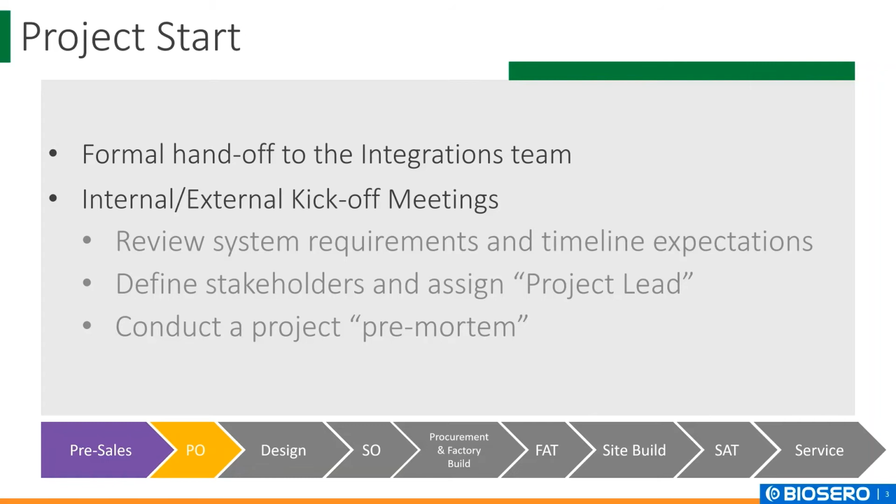The last step of the internal kickoff is to hold a pre-mortem, which is where we will openly discuss potential risks in the project and how we will avoid them. Using our extensive history in projects, we have collected a significant knowledge base which includes troubleshooting instruments, working with certain technologies, implementing applications, and more. During the external kickoff meeting, the Biosero project team will meet with the customer and discuss the project timeline, review the stakeholders, and discuss the project and next steps.